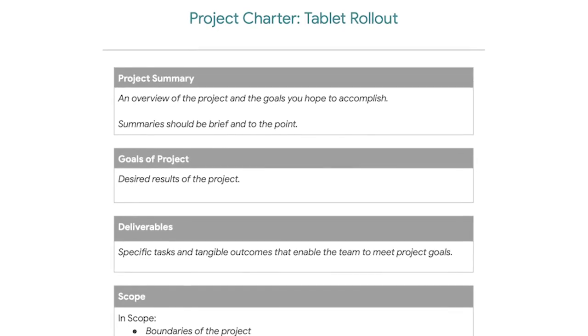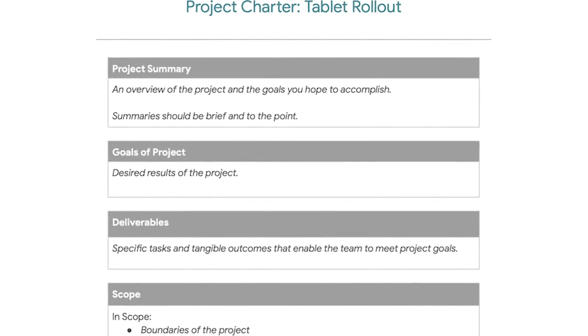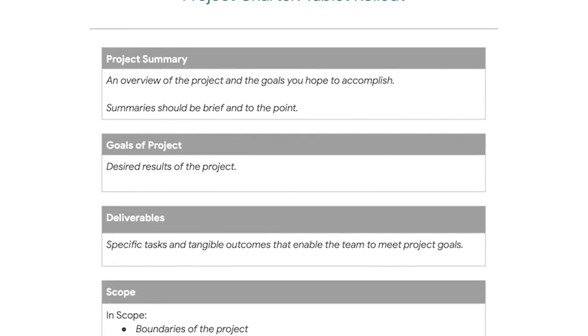One of your main jobs as a project manager is to identify all of the project tasks, estimate how much time each task will take, and track each task's progress. So how do you go about adding tasks and milestones to the plan for the very first time? The first thing I do is review the goals and deliverables in the project charter. Then, I make a list of all the items that have tasks or milestones associated with them.